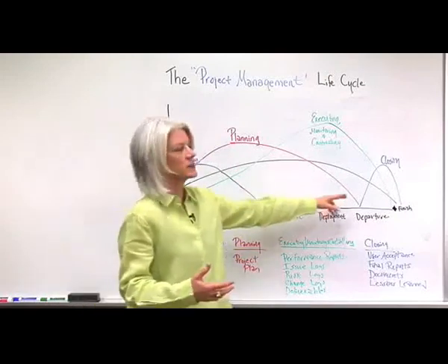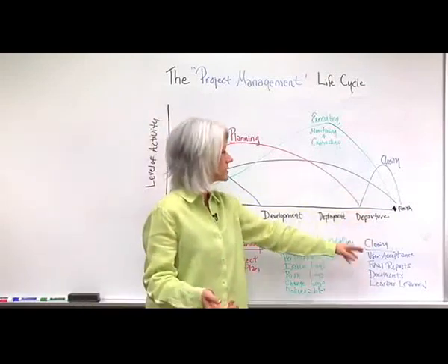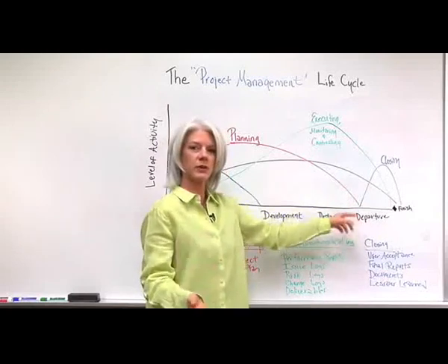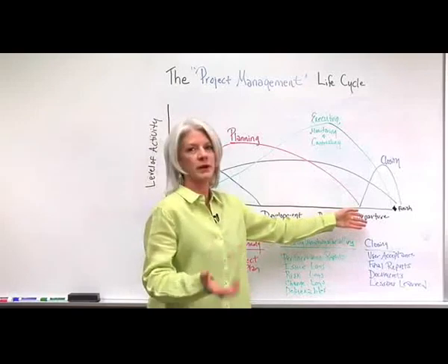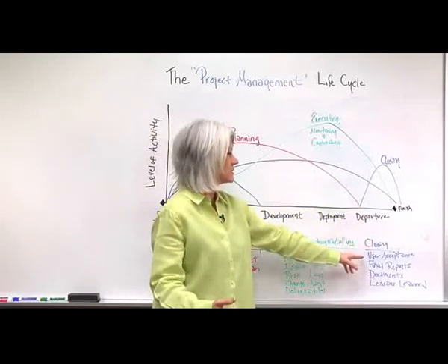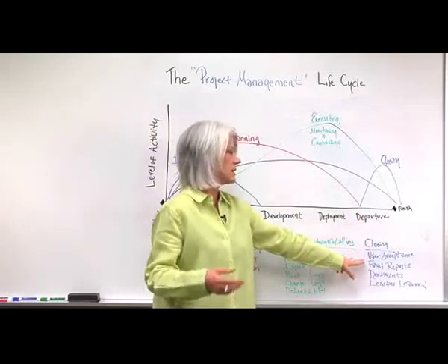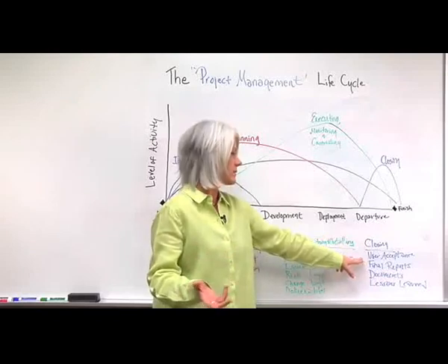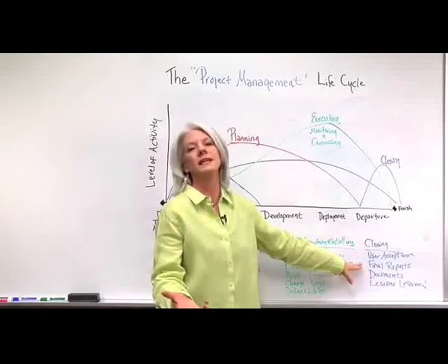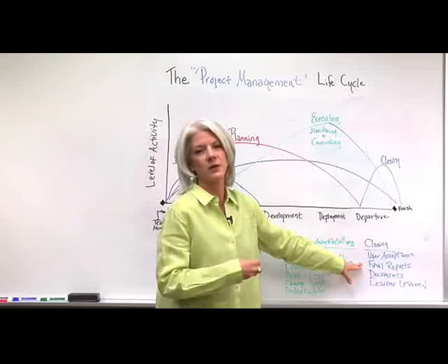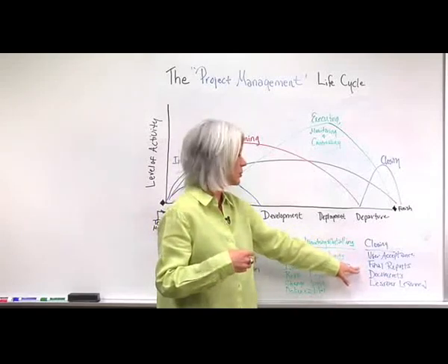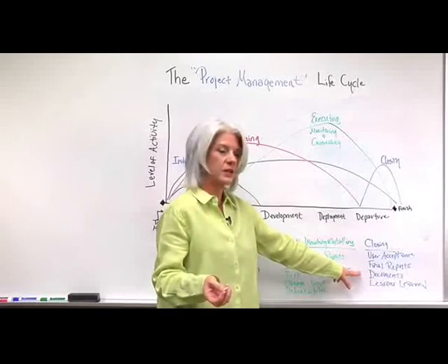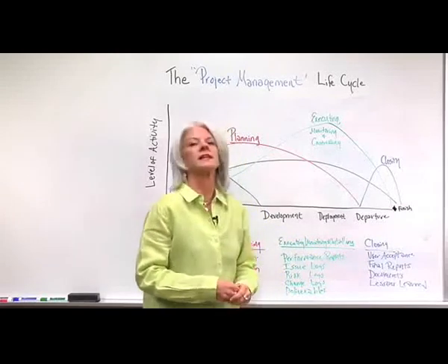And then ultimately is the closing. So the closing is at the end as the departure, so the team members begin departing from the project, so you're closing things out. So the main deliverables there are the user acceptance, the approval of the project, any kind of final reports that go out to different team members, the stakeholders, the change control board, and the project documents, and also the lessons learned.